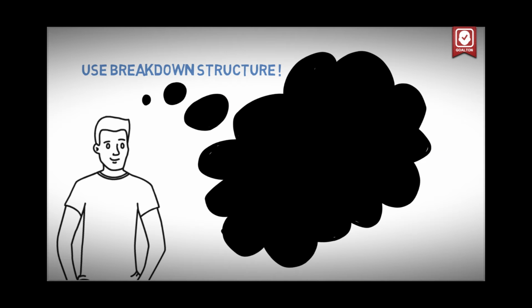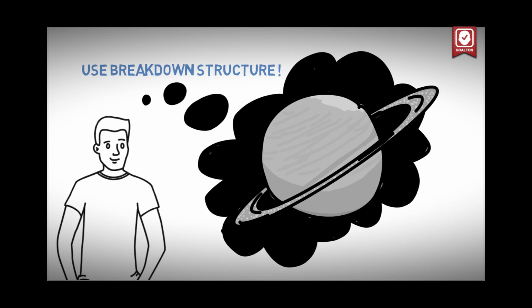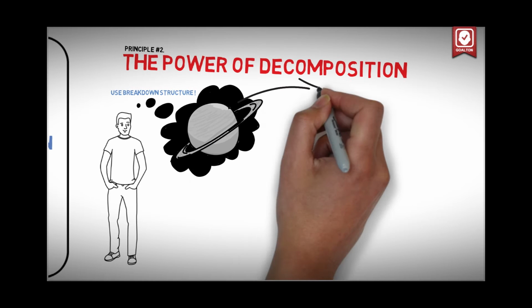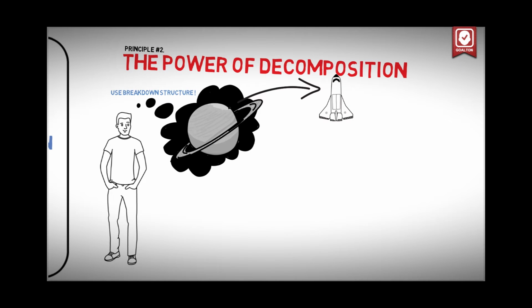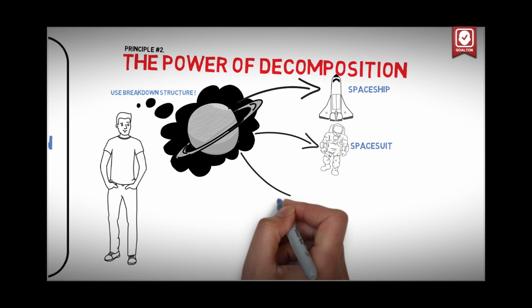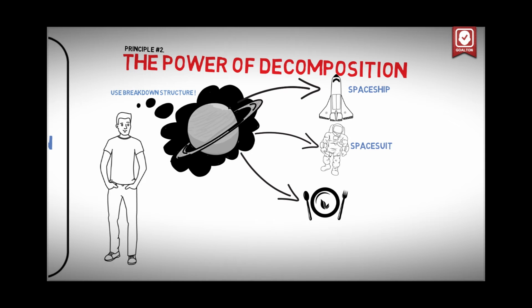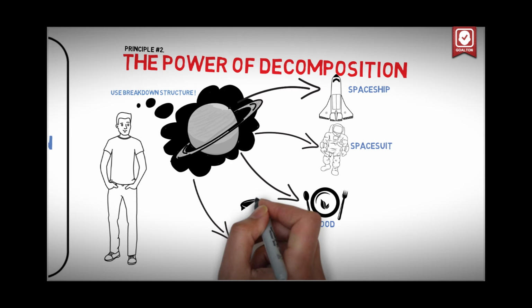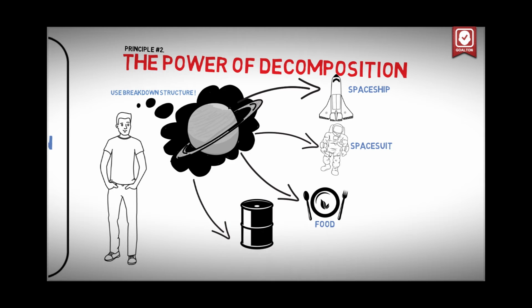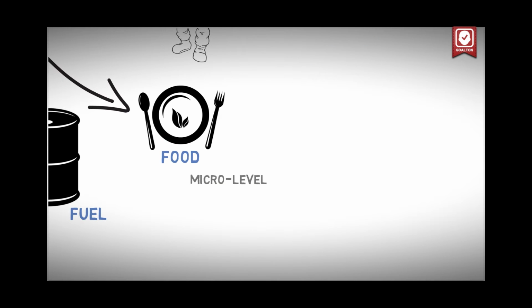The power of decomposition is in the fact that it allows you to understand more clearly where you have the exact problem or lack of knowledge. And the second advantage is that with sufficient splitting into smaller components, subtasks become so elementary that it is impossible not to find solutions for them. Your goal breakdown structure starts with the top level and is further decomposed into subtasks using the outline hierarchy. The best example here is a manned space flight to the moon.